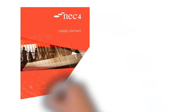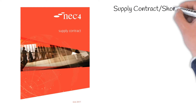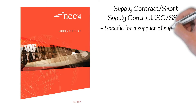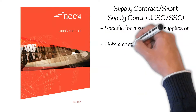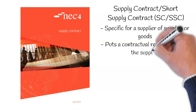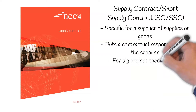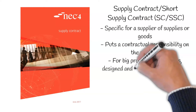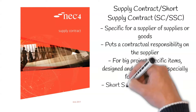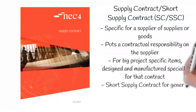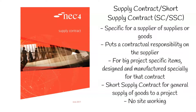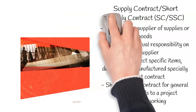Supply Contract, or Short Supply Contract, SC or SSC. This contract is specific for a supplier of supplies or goods. The purpose of this contract is to put contractual responsibility onto the supplier during a construction project life cycle. The supply contract is for big project-specific items which are designed and manufactured specifically for the contract. The short supply contract is for more general supplies of goods to a project. Neither of these contracts cover site working.